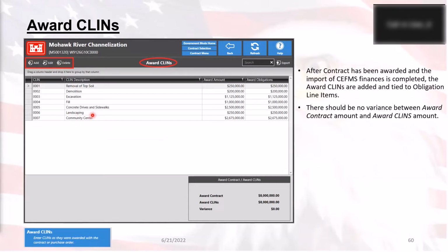One, if there's a modification that's already been on this particular CLIN that was set in RMS, RMS is not going to let you delete it. Two, if you remove this one, because RMS builds on building blocks, it starts with the bottom and then you have another building block on top of it. And if you take off the bottom, the whole thing is going to fall over. So you don't want to try and get rid of the bottom, because then the rest of it's not going to work. You could potentially make a lot of mistakes in the progress payments if you try and delete any of that kind of information.